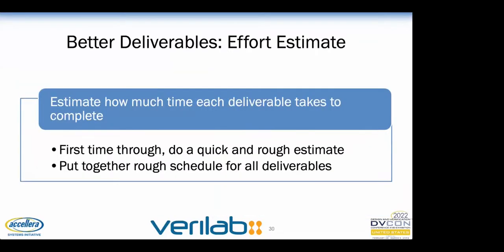If we've done all the steps up to this one correctly, we'll have a nice bundle of work that we can use to make an effort estimate. We're going through a rough estimate here and sanity check the overall schedule and tape out date. It shouldn't take more than a few minutes to estimate most of the tasks at this point, but some of the more complex ones might take more thought.